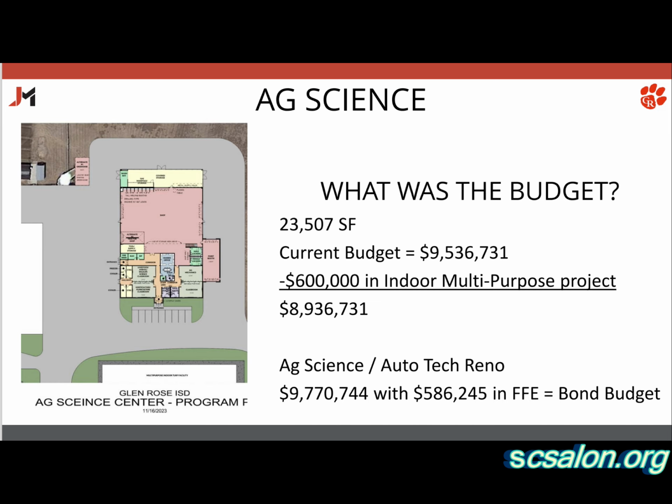I think Will said 400 there, and that doesn't include some moisture. I mean, it could be 400,000 very easily with the moisture and some things like that. When we revisit the risk on the moisture conditioning under that, that could be another 100,000 that comes off. So right now we're at 83,000 over, before any allowances are taken into effect.